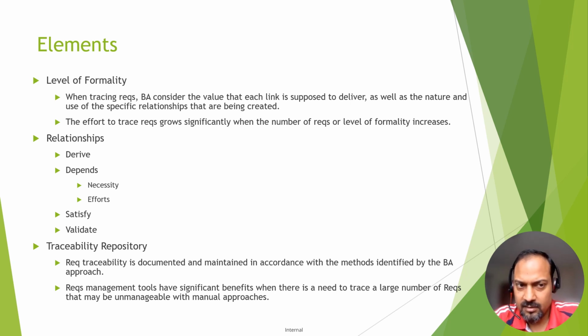Also, once there are a lot of requirements, you need to detail out the requirements. And when there are a lot of requirements together, it's very difficult to create or maintain a relationship, right? So that's why the effort to trace requirements grows significantly when the number of requirements or level of formality increases. Relationship. So there are four types of relationship: derive, depends, satisfy, and validate.